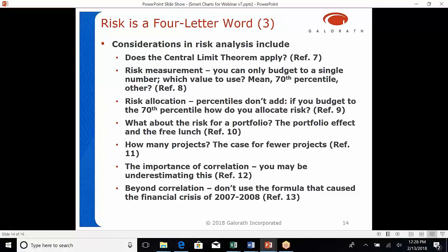So I advocate using a more sophisticated approach that allows you to take into account tail dependency, such as a copula method that marries together two distributions or more, that allows you to inject your own dependency structure, where you can incorporate tail dependency, such as a Student t dependency structure, because correlation is only one stochastic measure among many. There are many other stochastic dependencies out there, and a key one that we should not ignore is tail dependency.